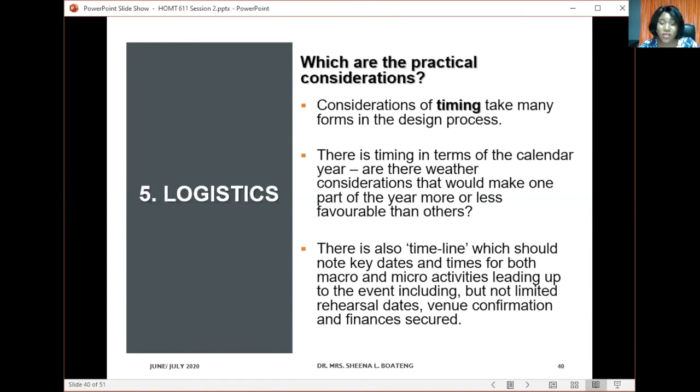Like I said, some people will wait until the last minute to book the venue. Some people wait until the last minute to go and look for a seamstress to sew the dress. Some people wait until the last minute to start looking for chairs and tables to rent, right? So you have to think about all these things so that you do not get caught in the sense where, when you are ready to book a venue, the venues can't confirm because they have booked all their dates. And you now have to wait to see if by chance you have the opportunity to get a date when someone cancels.